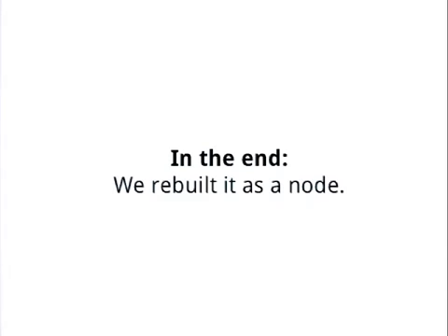And I think it really led to a dynamic where it just got contentious, because we would make a decision, implement it, they would tell us they didn't like it, and then we got really defensive. We would say, no, no, no, we did this right because of these 5 reasons. And we shouldn't be defending that after we've done it. We should be presenting them our plan and then defending it before we build it, so that it can be a lot easier to change things and change our minds.